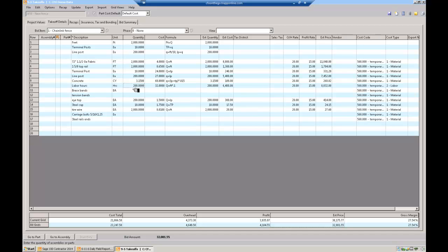So I made this quick and dirty, very simple. I could have part numbers in here to make it easier. I just wanted to build something quickly so you could see how easy it is to do. We would import your parts so you have all those parts in there automatically and help you build these formulas, and then every future estimate becomes easier. Obviously, you're going to have 6-foot fences, 4-foot fences, 3-foot fences, so you have an assembly for each one of those and different parts for each one. But once you get them built, every estimate from here on out becomes significantly easier to do. Again, we just drop in some assumptions and some knowns, and everything else calculates out for me.